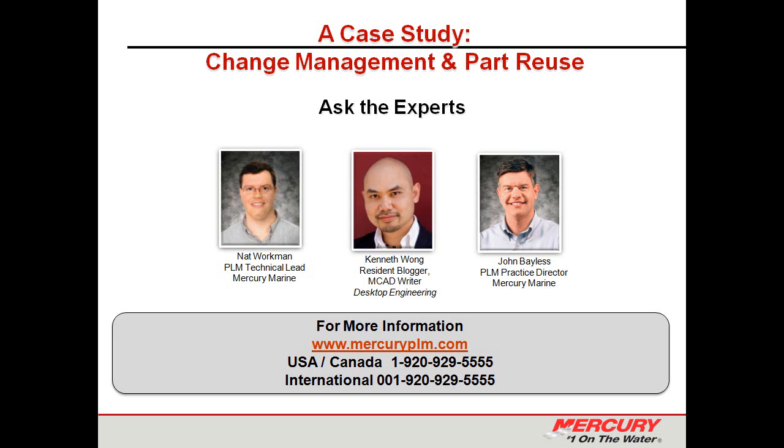As a follow-up to that, one of the neat things about the change board is the person who initiates the change, especially on the Class B side, will come to the change board meeting and present their change. And then the cross-functional participants on the change board, it's program-led, but there'll be people from quality and supply chain and manufacturing and so on, and from whatever plants are affected by that particular change. And so the person initiating the change has an opportunity to say, this is why I think the change is important, this is how I think it's going to affect you. And then the people who are affected by it can respond during that session, rather than having emails bounce around.